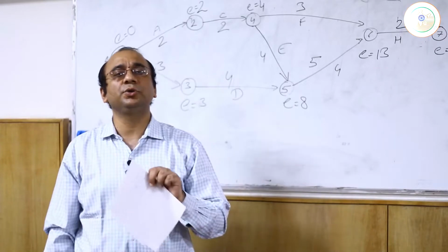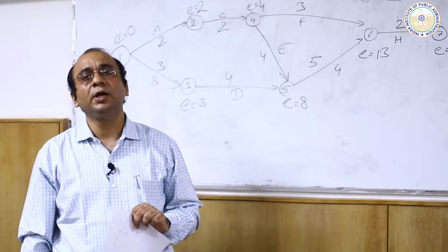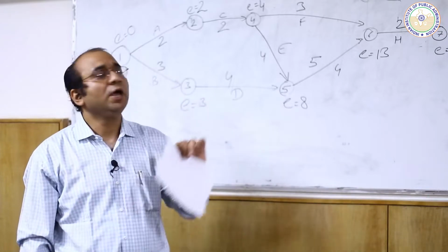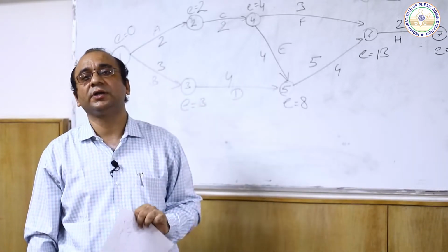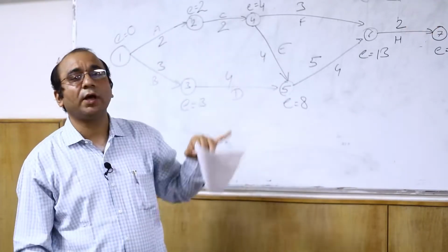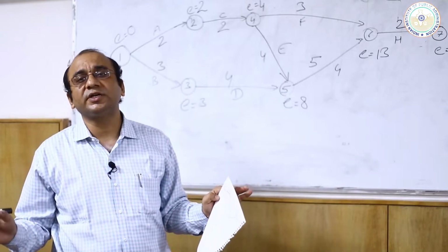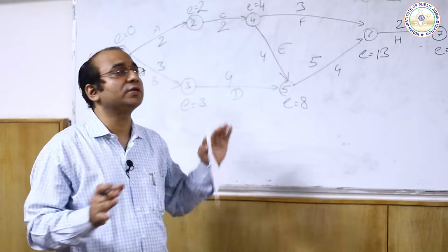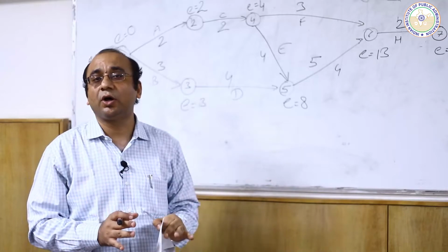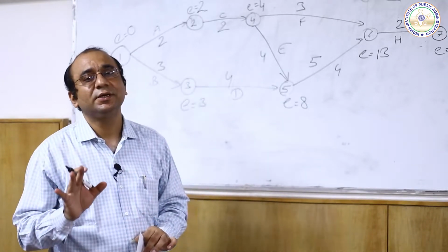That was my first question. Management wants to know how much time we require to finish our project. They have a deadline of 16 weeks, but we are able to complete the project in 15 weeks. Otherwise, if you total up all the time, it will come to around 25 or 26. That means, are we going to have 26 weeks to complete the project? No, because there are some simultaneous activities going on, by which we are able to have lesser time.